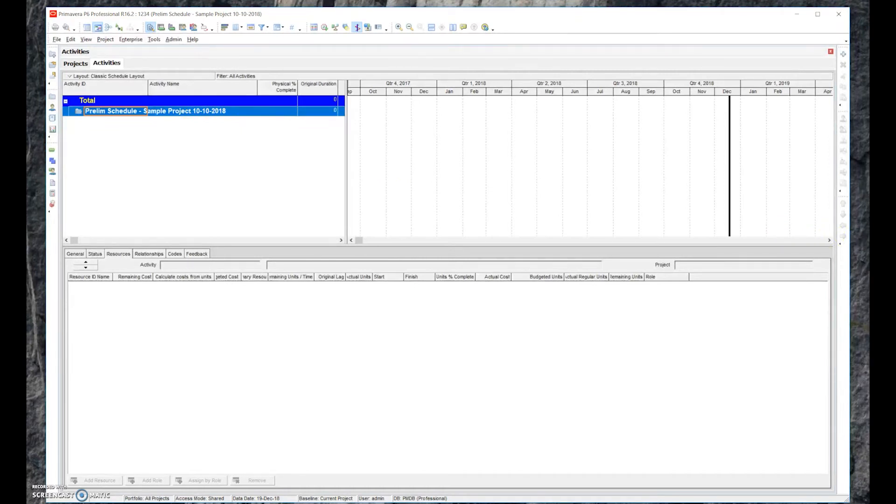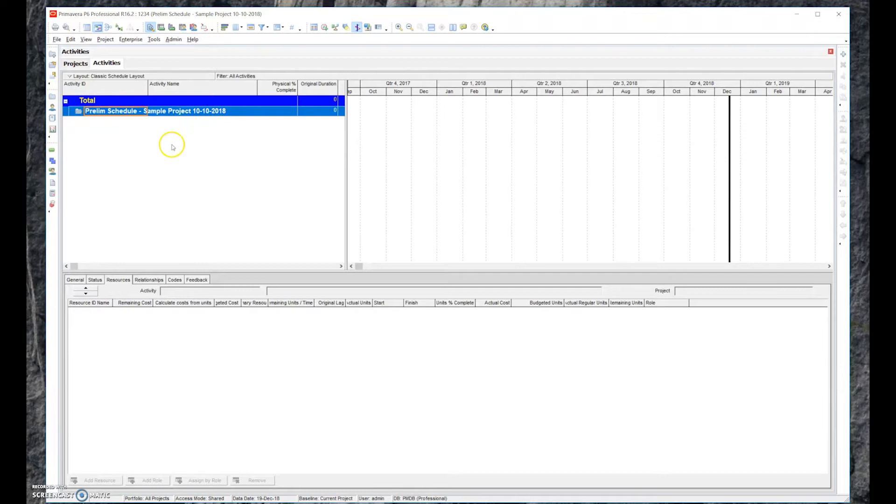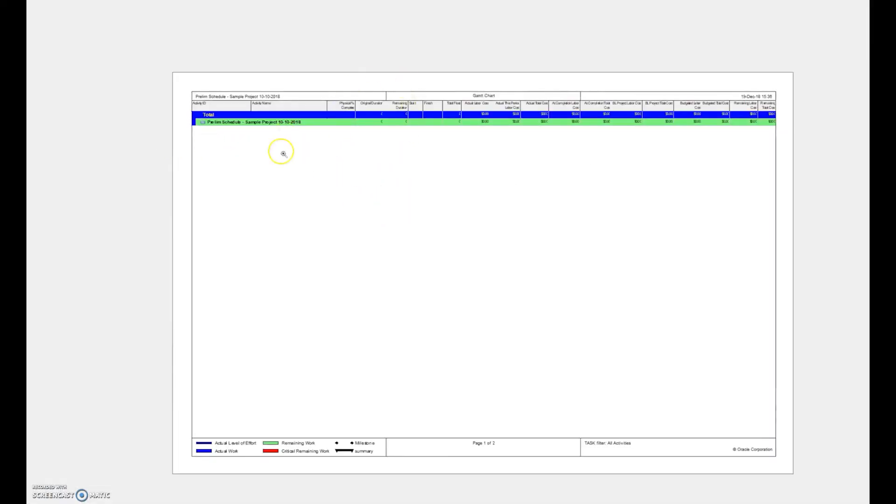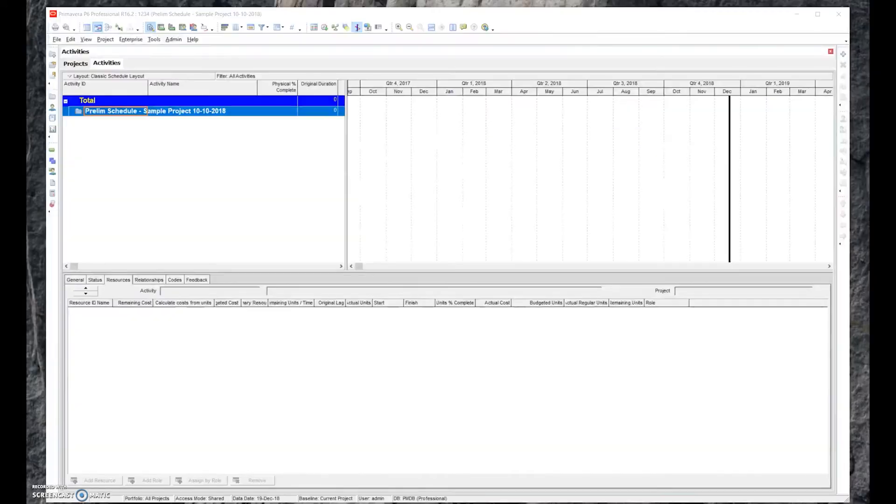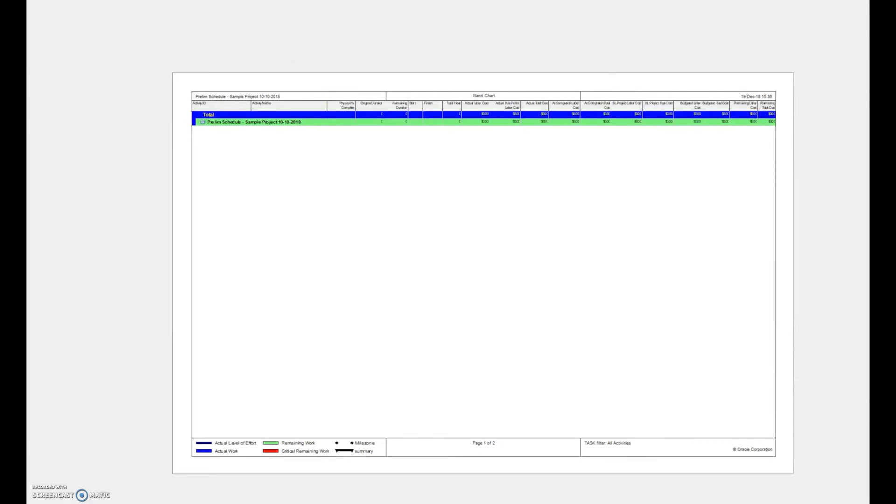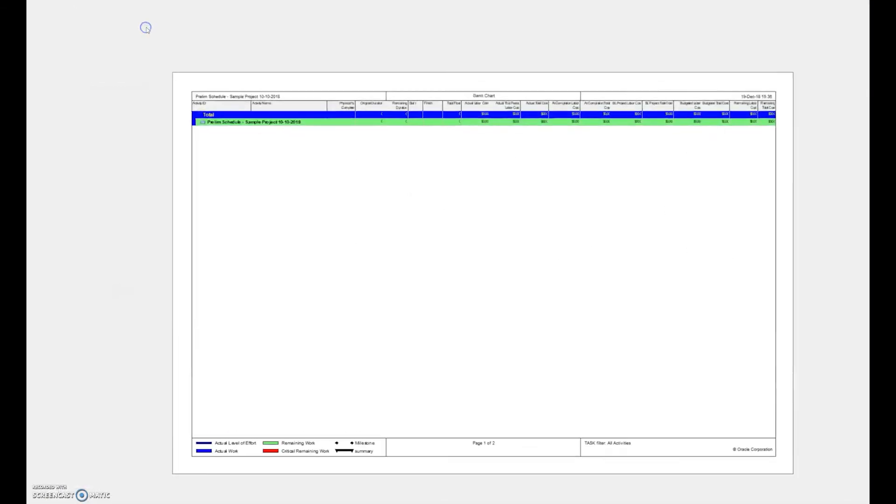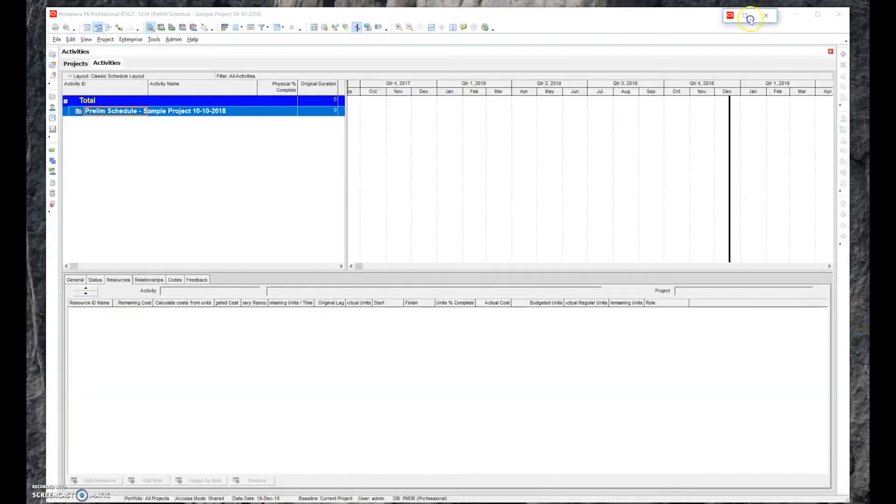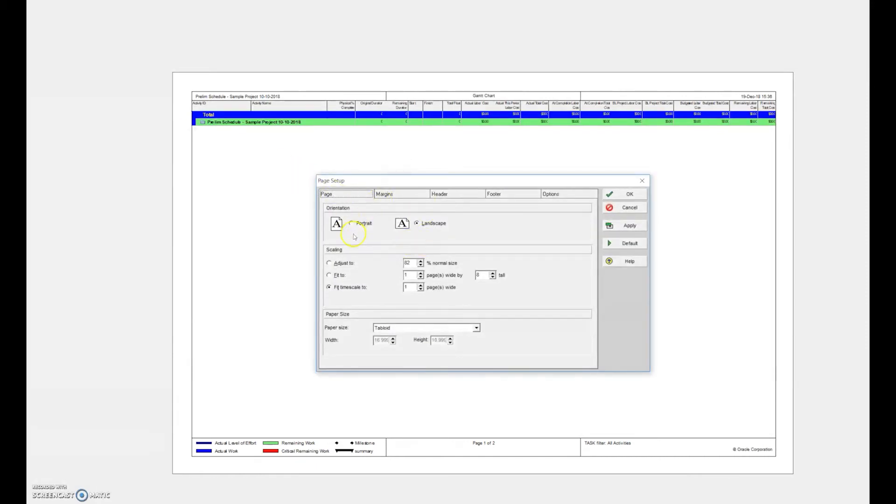Let me show you some print functions right now. We have nothing in here really, but I want to show you how to print some different things. If you go File, Print Preview, you see that we have the schedules right there. I'm going to bring this over. In the section, you can't see it in there, it gives you an option to go ahead and set up some of the print preferences. Some of the print preferences, there is a page setup view. We're going to click on that and it's going to give us this dialog box. We want to print landscape. We want to fit everything to being one page wide, because a schedule to be accurately read needs to be one page wide. We can do it on Tabloid. Tabloid is 11 by 17. We want to keep it that way.